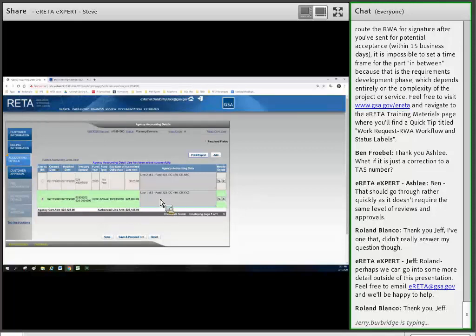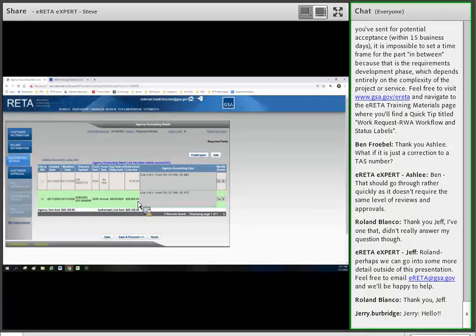And at any point in the future, let's say we billed you for a couple months now, we're getting close to maxing out or spending that $25,000, you can come in here at any given time, 3 months down the road, for example, do an administrative amendment and simply check this other line and save it and send that down, and now any bill that's generated from this point forward will reference this funding source on the second line. And you can come back in and out and change this every month if you wanted to. I don't know why you would want to, but you could. It's not stopping you from changing which line is referenced in any given billing statement.